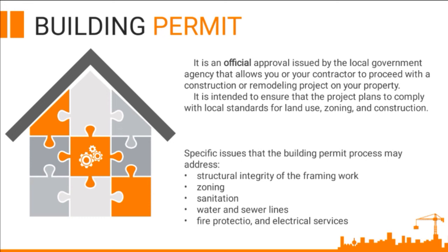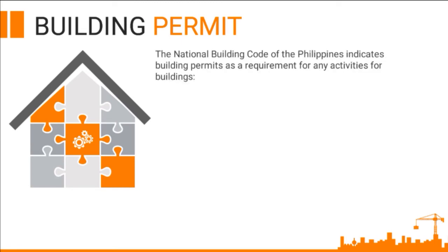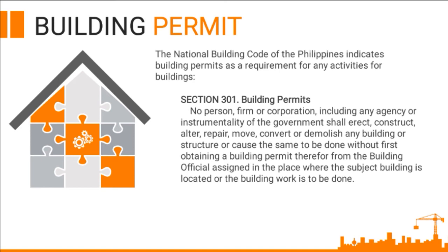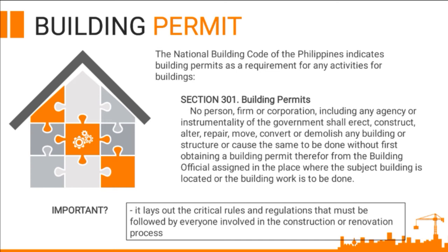You are not allowed to build without a building permit. Even if you are an engineer who has passed the board exams, you cannot construct a building anywhere you want without permission. The National Building Code of the Philippines indicates building permits as a requirement for any activities for buildings. Section 301, Building Permits: no person, firm, or corporation, including any agency or instrumentality of the government, shall erect, construct, alter, repair, move, convert, or demolish any building or structure, or cause the same to be done without first obtaining a building permit from the building official assigned in the place where the subject building is located or the building work is to be done. It lays out the critical rules and regulations that must be followed by everyone involved in the construction and renovation process.